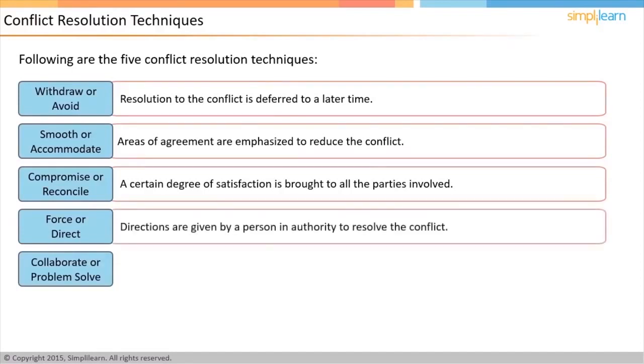In force or direct, a person in a position of authority directs how the matter should be resolved. It may be necessary to do this when the matter has to be resolved immediately. However, this may result in upsetting one or more of the conflicting parties.